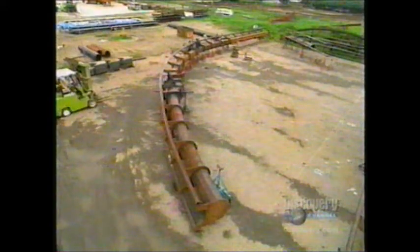The way we do that is that we build a section perhaps 150 feet long that'll be made up of 4, 5, or 6 different individual sections. Once we're done, the last section from that setup is disassembled, and that one comes over here and becomes the first section of this one, and then we build on out again. So in essence, we build the track continuously.